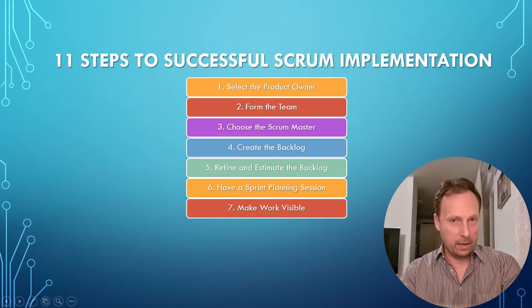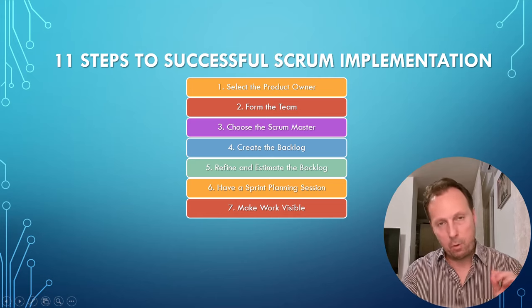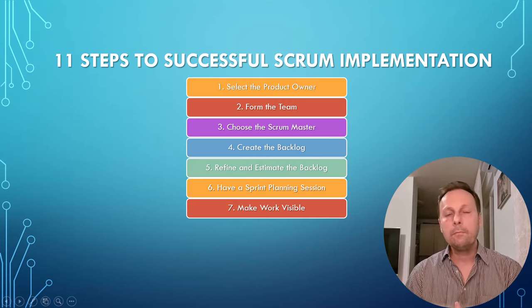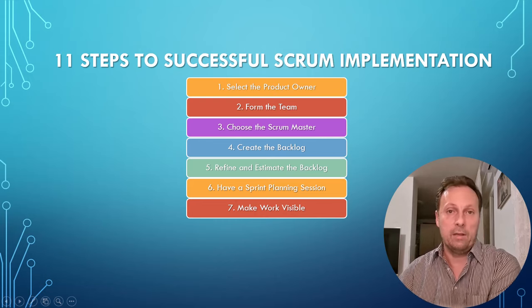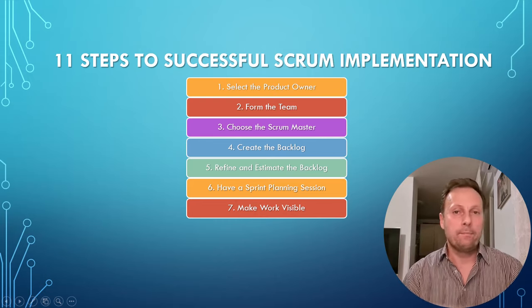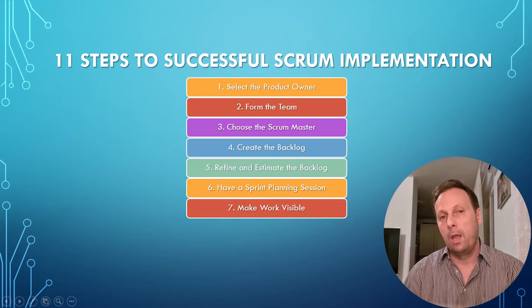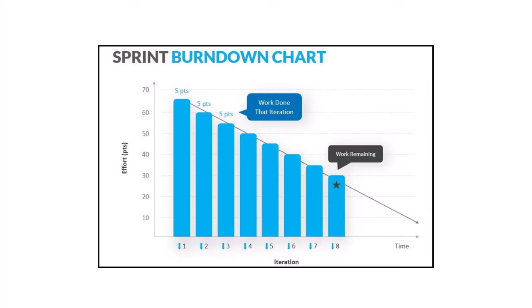Step seven: make work visible. The most common way to do this in Scrum is to create a Scrum board with three columns: To Do, In Progress, and Done. Sticky notes can represent tasks, and team members move them across the board as they complete them. Another way to make work visible is to create a burndown chart. On one axis is the number of points entered into the sprint, and on the other is the number of days. Every day the Scrum Master tallies completed points and plots them on the chart. Ideally, the graph drops steeply to zero remaining points on the last day of the sprint.